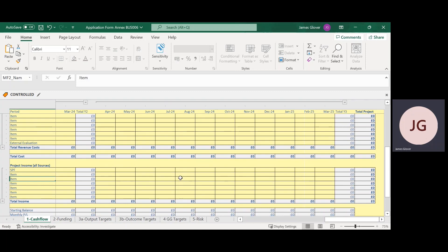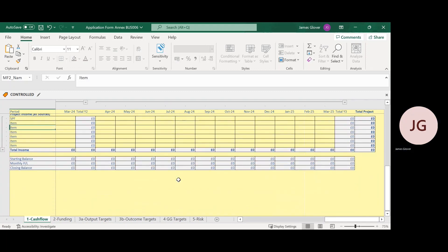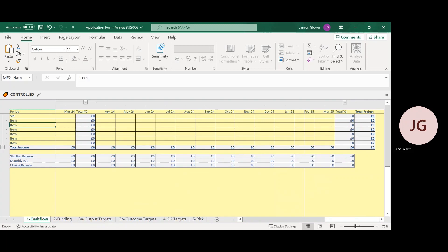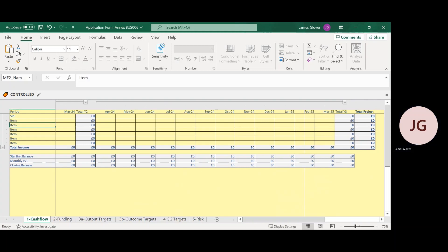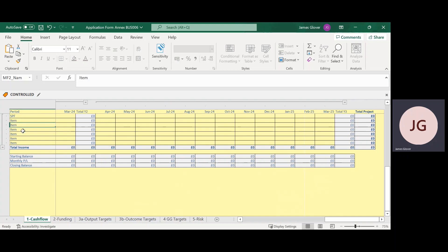Please list other private and public match funding sources that will complement your SPF request. SPF can accept public match funding in addition to the SPF request. Match funding could include bank loans, cash reserves of the business, heritage lottery funding and other public grants. Check your figures carefully and ensure they reflect the evidence you have to support them, e.g. letters of confirmation from match funding providers.